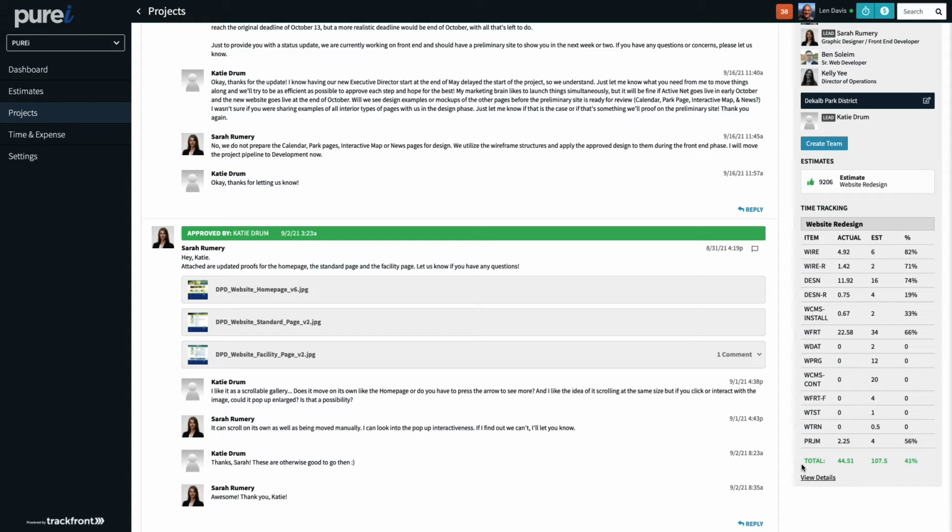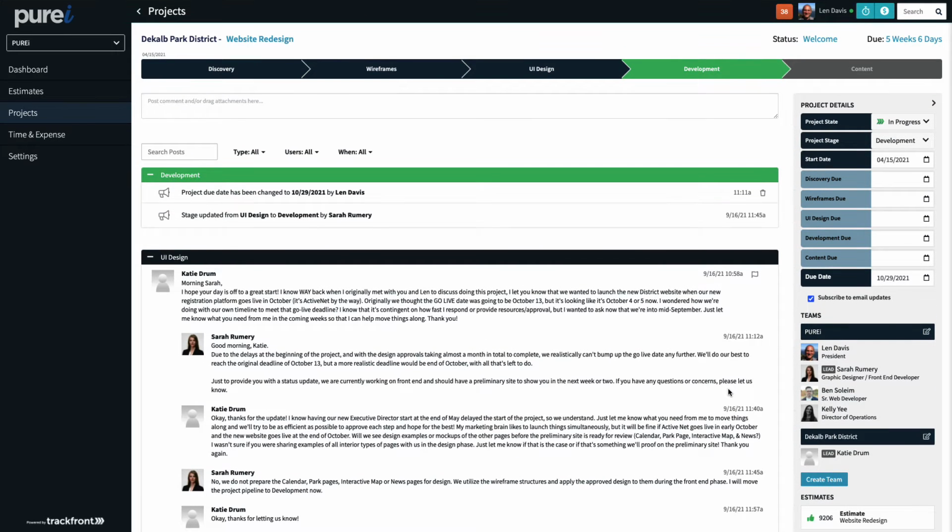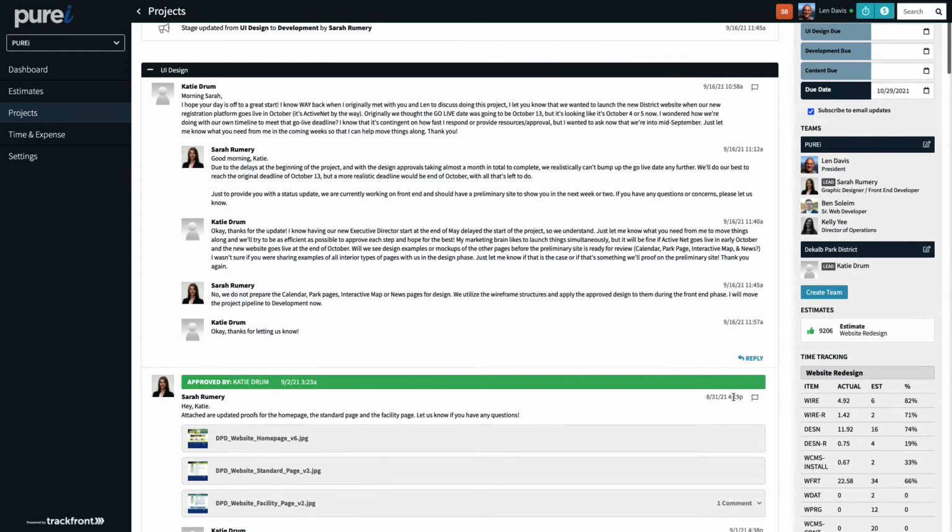And then you can always take a look at the totals down here, which show your progress overall in the project. And this is a good indicator to say, hey, this project is 41% of our budget. Are we roughly 41% done with this project? So this is a good indicator to always keep an eye on for you and your team members.